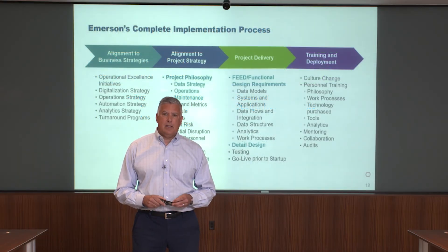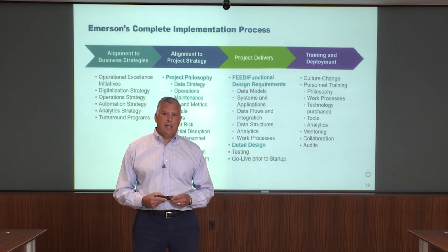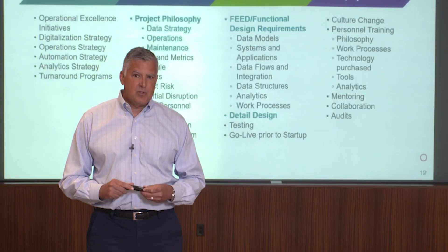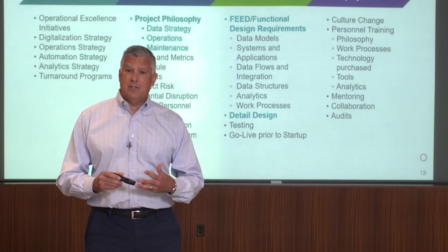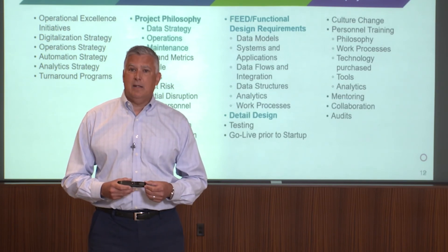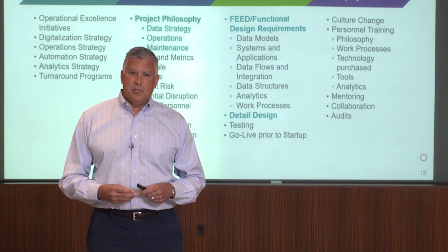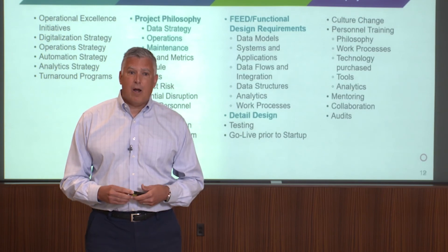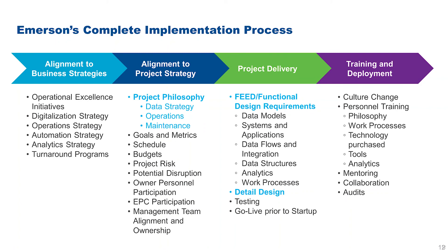Projects are focused on schedule, risk, and cost, so those goals sometimes conflict with operational strategies. The best way to achieve alignment is through philosophy documents — documenting your vision for data strategy, operations, and maintenance. Those documents are then used during front-end engineering and design to determine systems requirements and data flow requirements, and during detailed design for configuration, testing, integration, go-live training, and deployment.